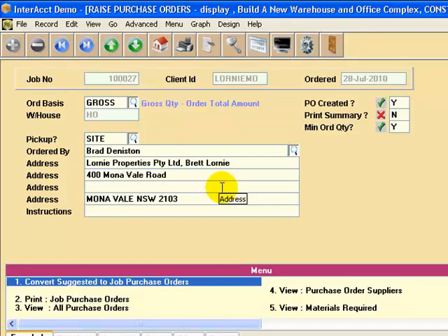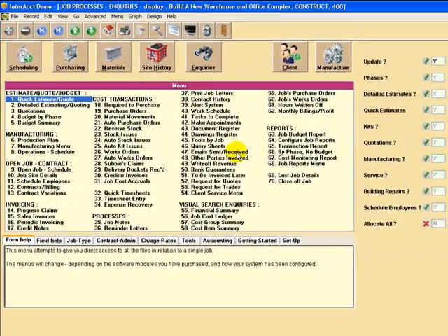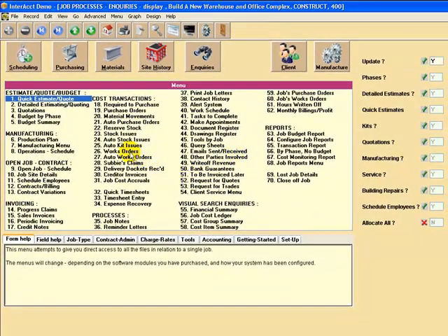When you're happy, or in fact you could even run the purchase orders or the pro forma purchase orders initially as requests for quote, RFQs, on different alternate suppliers to get your price quotes in from different suppliers. And when you're happy with your pro forma purchase orders after changing them around a bit, you run an automatic process that will convert them into real life purchase orders. And when that happens, you can see, by the way, a summary of the purchase orders on this particular screen.